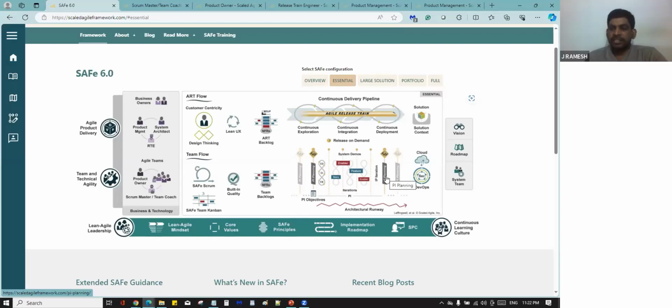It's part of the release. It's not a full release. What happens if it's a project like Google or Amazon? Good example, Amazon. We take the first 3 months or 4 months. We split it into sprints. Consider January to March end. The 3 months, each and every month two sprints, 6 sprints. So we plan for these 3 months. Yes, we have the partial release.